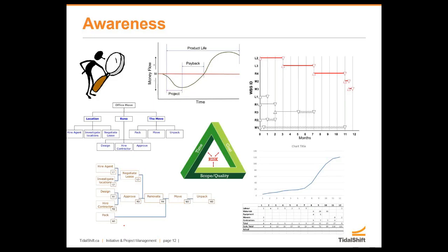And the data, information, knowledge, wisdom model is all about data process or data flow. So data is this raw data that comes in. When we get a status report and we say this work package is 50% done or 70% done, or I've spent this many hours or dollars on something, that's raw data. When we take that raw data and put it into the context of our project plan, it becomes information. Now, information becomes knowledge, knowledge becomes wisdom, and basically wisdom is the interpretation, the awareness, the do I understand that data.